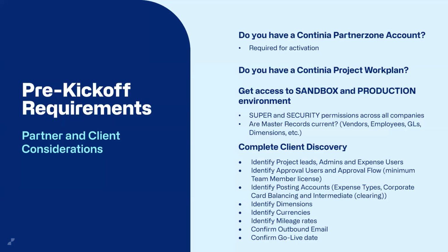And then you also want to complete some level of client discovery before we start implementing and before we introduce the client to the environment and they begin their testing. So here are some areas that you want to discuss. You want to gather our test users. So who are going to be our project leads, our admins, our expense users that will be testing? What is the approval process looking like for your client? What would they like approvals to go? And who are those approval users that will be setting up?